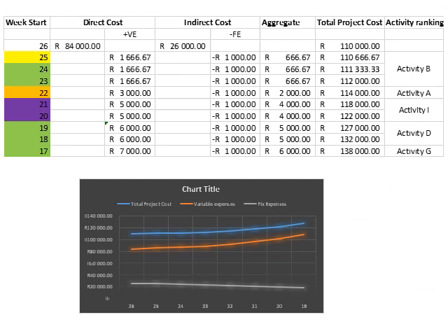You use your items. So firstly, you start with your cost, what the project would cost if you had normal time. So at 26 weeks, we could calculate that we had a direct cost of 84,000 and indirect cost of 26,000 Rand. Okay, and then you can see our fixed cost is quite linear. As the project time is reduced, the cost goes down.